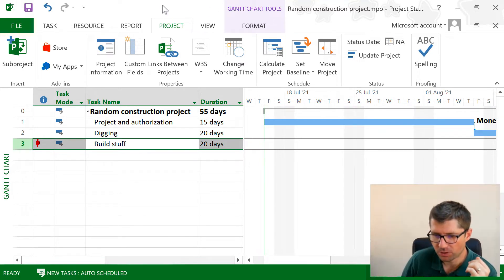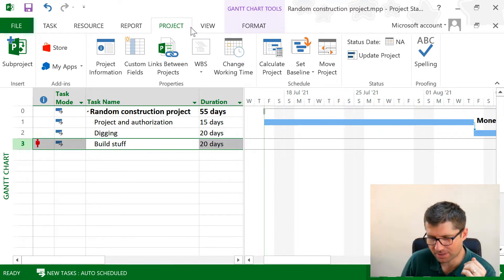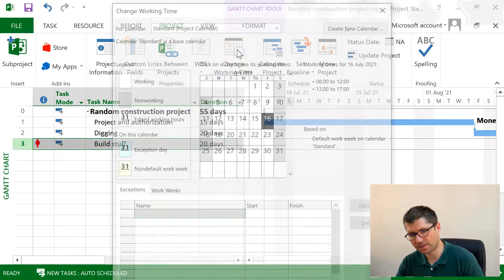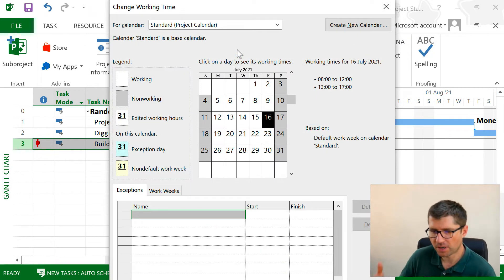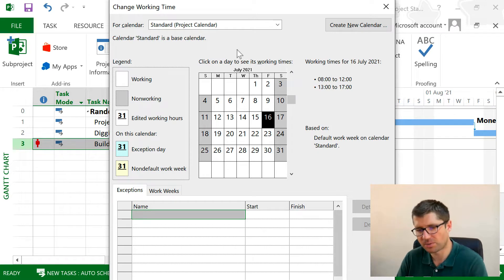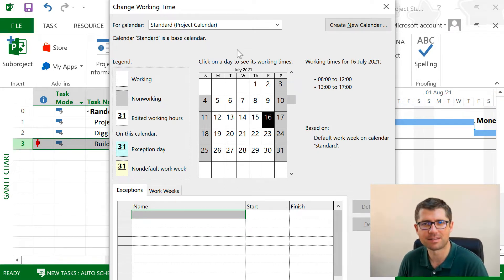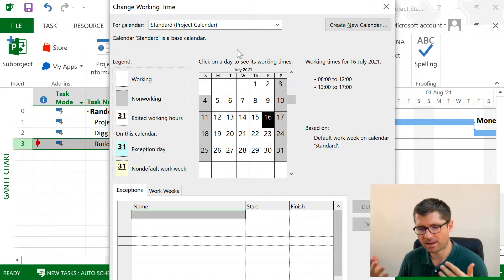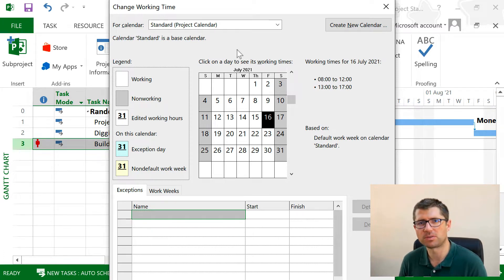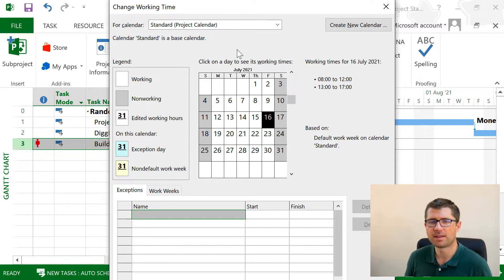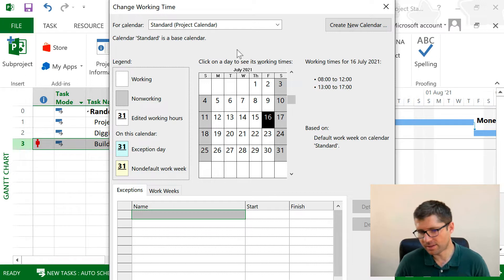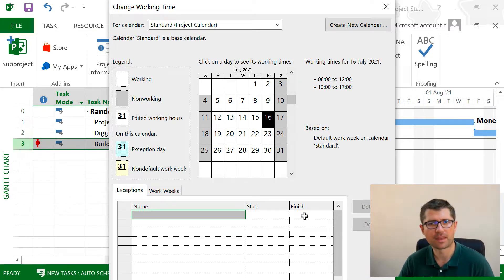Now if you go into this tab here, I have this option called Change Working Time where I can see what's the project calendar for this project. We see that this is the standard calendar, in which I'm working from Monday to Friday, eight hours a day, and I'm not working in the weekends.